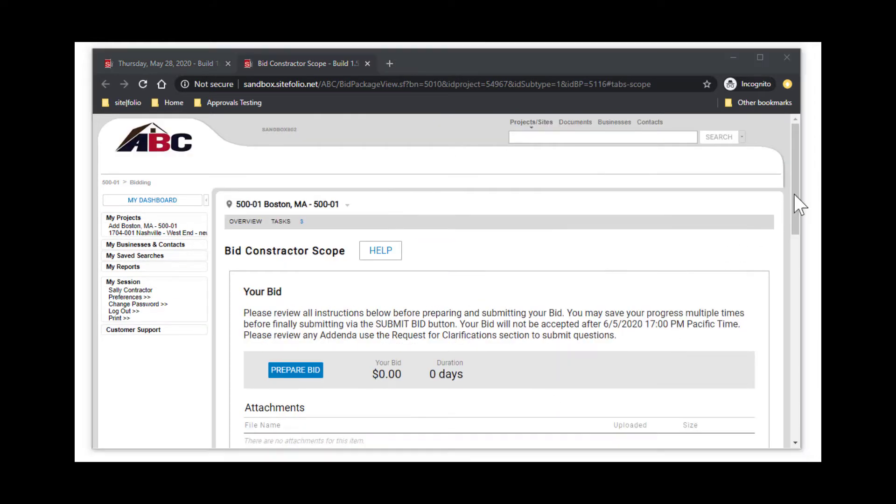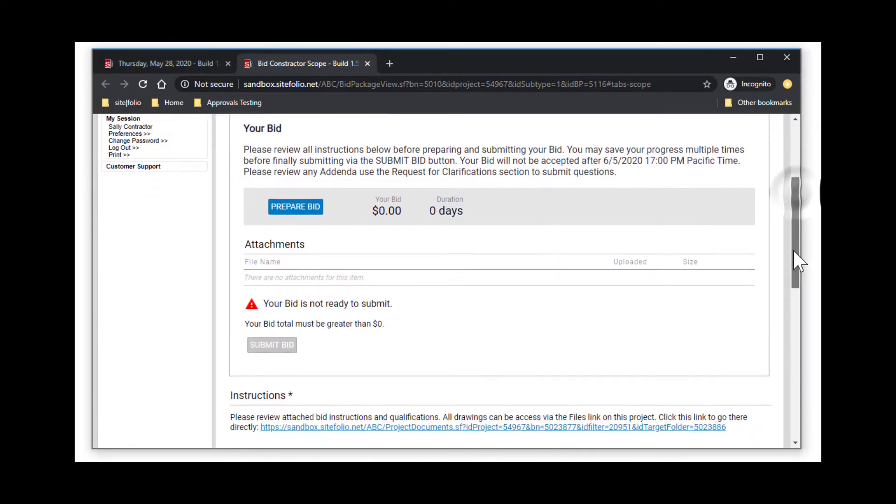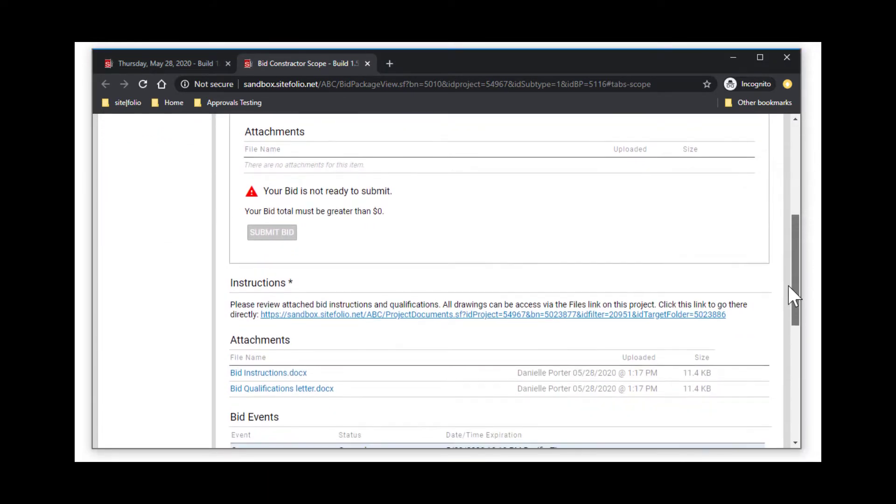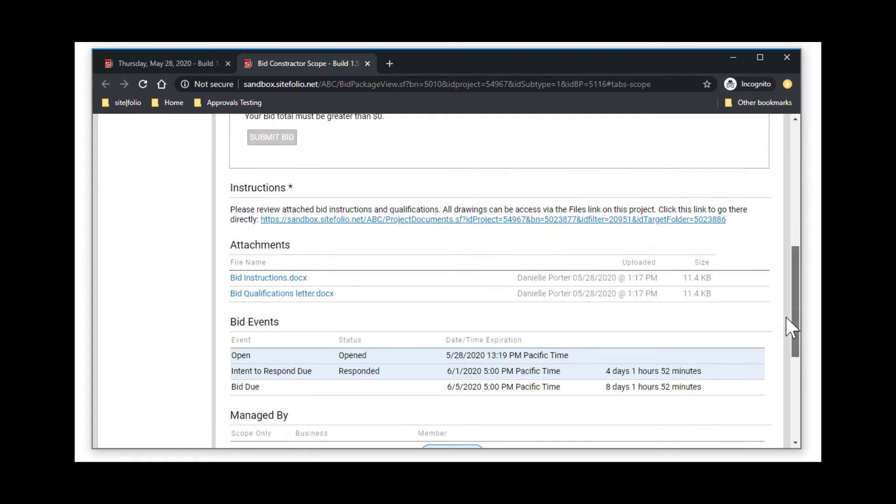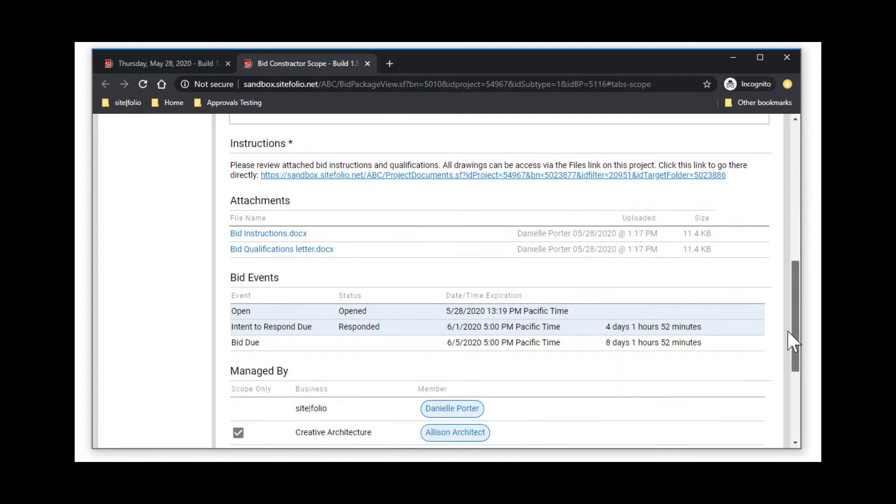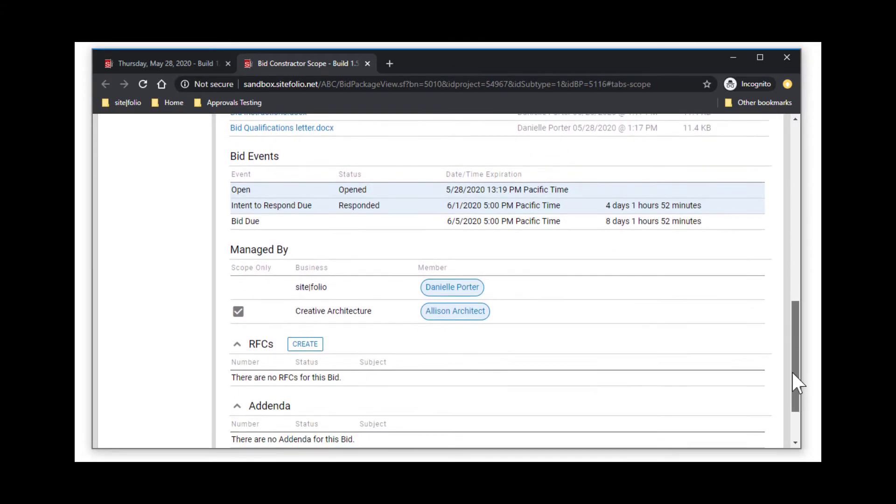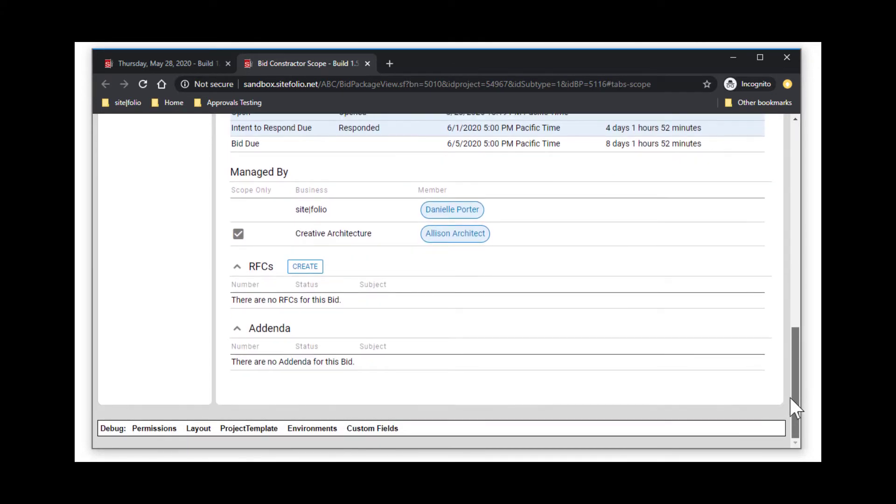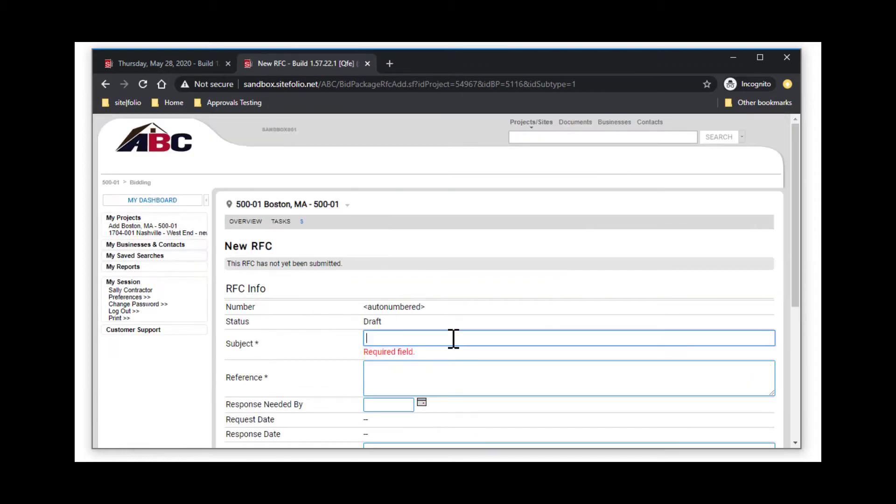As you begin to review the bid scope of work, if any clarifications are needed, you can make a request for clarification directly from the bid package. Scroll down to the RFC section of the bid package and select Create.